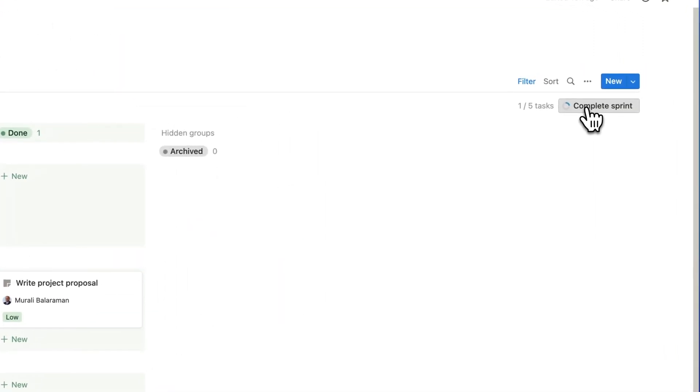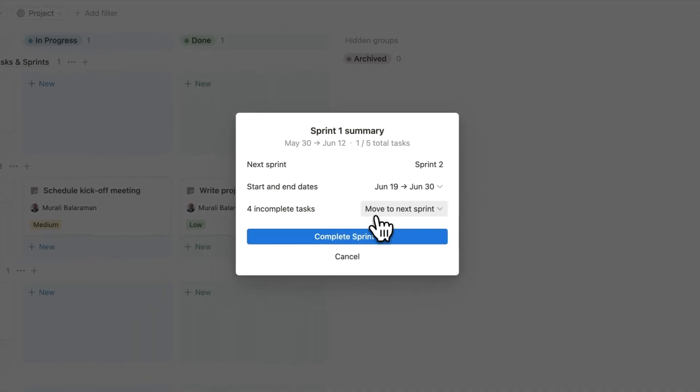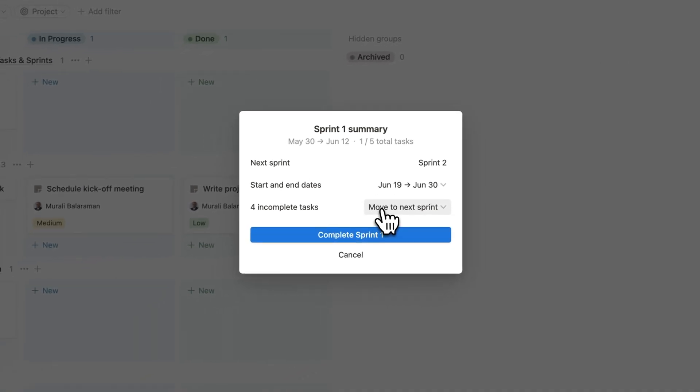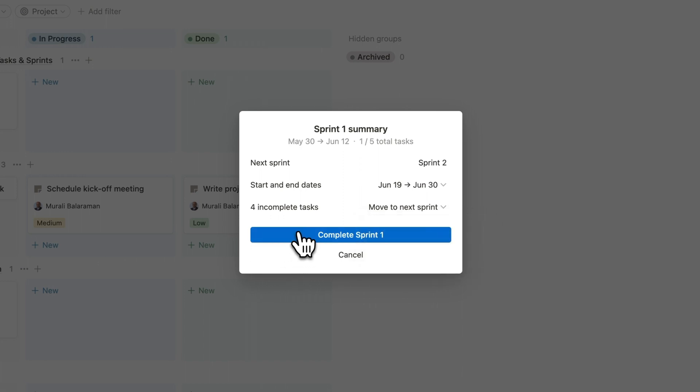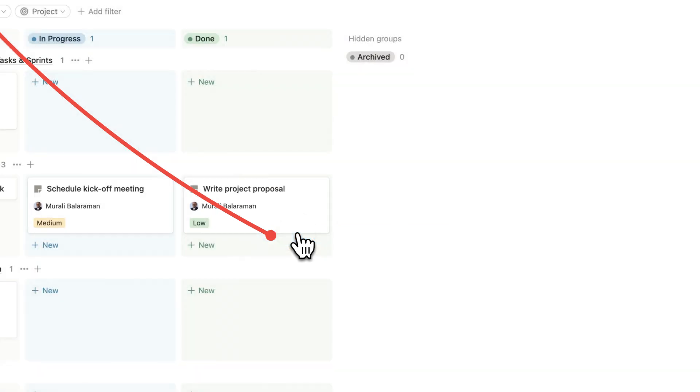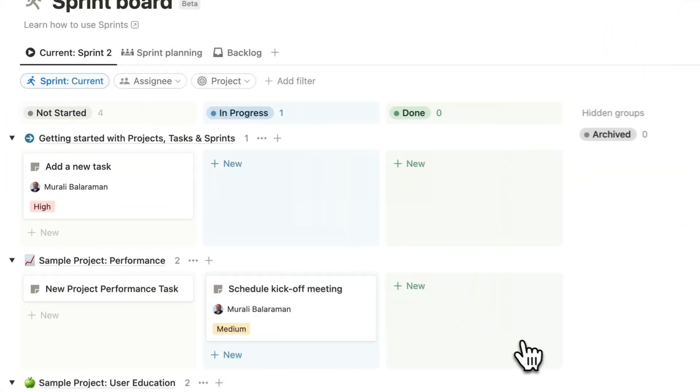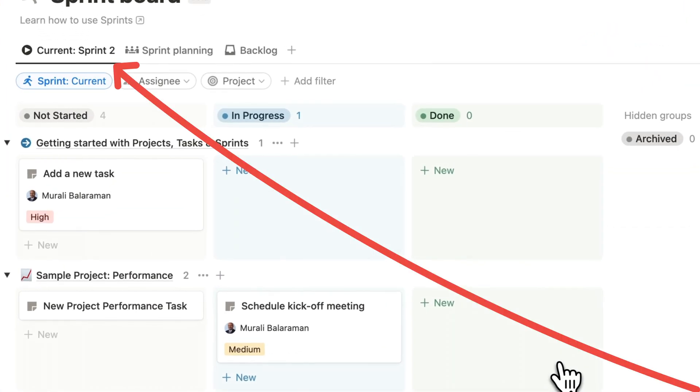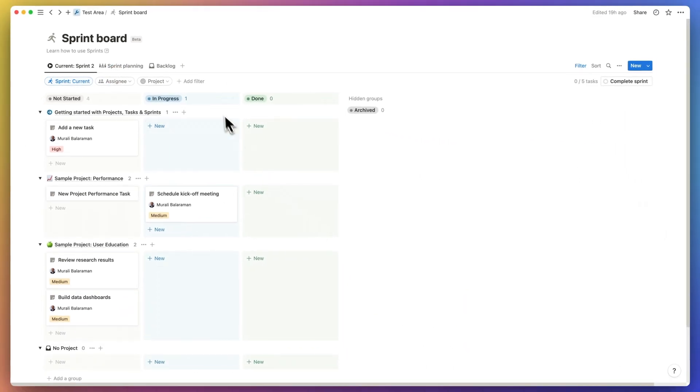When you click on the complete sprint button, it'll specify that next sprint is sprint 2 with the option to modify the start and end dates. There's another neat feature that's regarding the incomplete tasks indicator. Incomplete tasks can be kept in the current sprint or move to the next sprint, to backlog, or to any other sprint that you may have defined earlier.